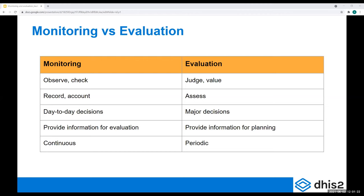Monitoring serves as input to evaluation. Once you've discovered a systematic set of problems through monitoring, you can then evaluate why you ended up there, what factors contributed, and what to do going forward. Evaluation has more of a judgment or value perspective — you want to say why, and ask: is this good? Is it bad? How should it have been done? Evaluation is used for major decisions — not just day-to-day — like where do we want to be next year, what key areas do we need funding for? It provides information for planning and is done periodically, maybe at the start, midway, and end of your program.